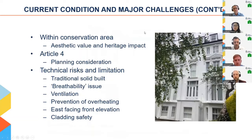The building is not listed, but it is within a conservation area. Naturally, there are constraints on what can be achieved with the fabric. Although it is a general risk, we have increased input from the planning department. Camden have ensured that the planning department is aware of their net zero carbon aspirations and accordingly have a pre-application procedure in place specifically for retrofit properties. An application has been submitted for the pre-app, with constructive conversation, in addition to the onboarding of a heritage consultant.